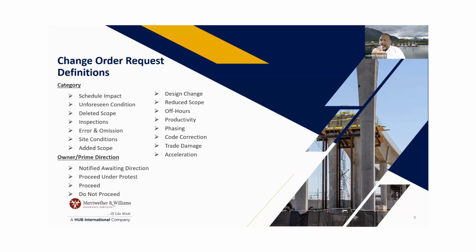Another thing that could happen with your scope is you could be on the critical path, because you could push the end of this project because of that delay. You've had time at the beginning of this project to say, this is how many days it's going to take. Once you give your time and it goes into that schedule, it becomes part of this contract. So they're going to hold you to it, and that's where the liquidated damages come in. You don't want to have those liquidated damages.